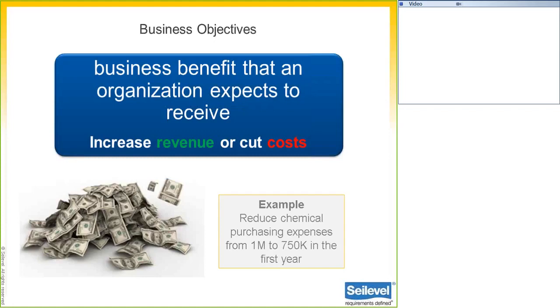And if you don't know what the dollar amounts are to put in your objective statements, you could think in this particular case it could be about how do we reduce the number of wasted chemicals, and we'd have a number associated with that, or the number of hours spent on managing chemicals, right? So we'd look at the employee's time. So there's different ways, again, that we can find some proxies for money in this particular case. But the key is no matter what you use, you need to have some kind of measurable metric associated with these objectives.